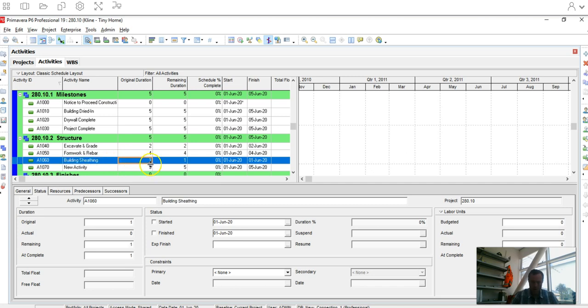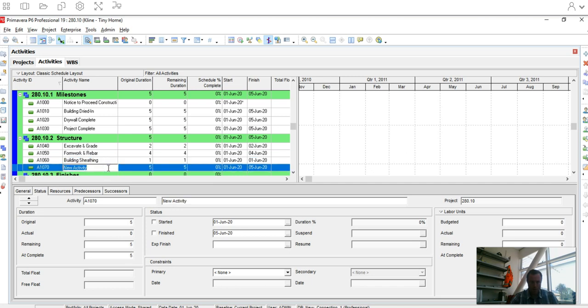1 day here. Okay. And then, I'm not organizing like I did in Touch Plan, where they're organized by trade, but now we're organizing by category. So a common way we would do it on a job site too is by the divisions. So let's just say concrete, yes, but you'd also have your rebar, maybe your structural steel. So we would organize them by the main categories, or these WBS of your job. So substructure, exteriors, interiors, landscaping, those main categories that split up your job. So that's what we're doing here.